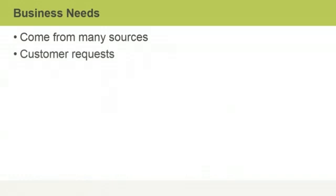Customer requests can drive new projects by making it clear how a business can meet their needs. Say your company designs and develops mobile games — a major customer contracts you to create a game for release along with a major sporting event. The need driving the project is the customer's request for the game.